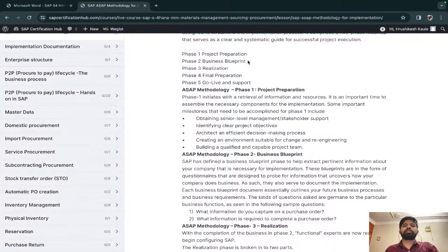Then the realization. The business blueprint document is to be signed. The sign-off has to be taken from the counterpart. They will give some people, maybe from the director, the IT head, the IT manager, all of these guys. They have to physically sign, and this means you have accepted your as-is, you have accepted what the to-be is, you have accepted the gap, and only these things will be done in the coming future. So this is your project scope, a detailed project scope.